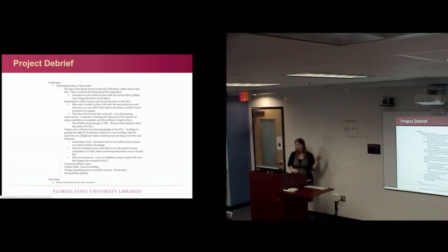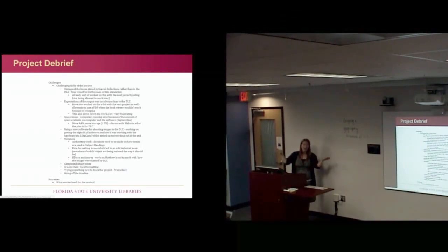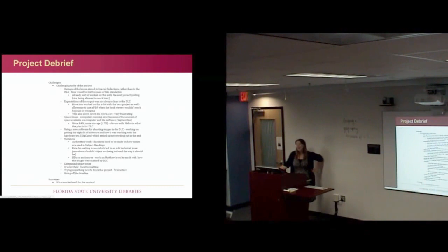So this is a screenshot from one of our project debriefs. This is a screenshot from the project that sort of imploded in the DLC. There were lots of things that went wrong. There were lots of communication issues. And one thing that we learned in terms of our team with this is they really did not want to disappoint me. But I had made a really bad decision, and they were trying so hard to make that bad decision work that they were starting to fight, and there was all this problem with the material. So what we learned is that they needed to be comfortable to tell me when I was wrong. And that I also needed to be a little more forthcoming when I thought I saw tension growing between them, asking about what was happening.